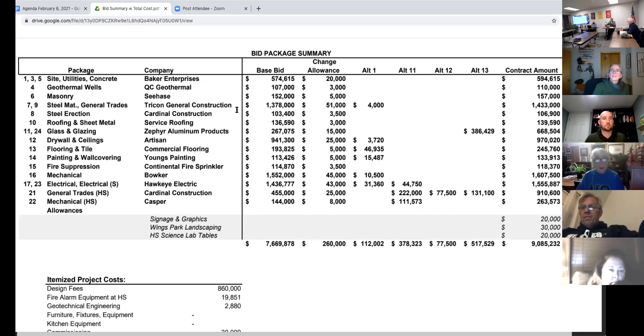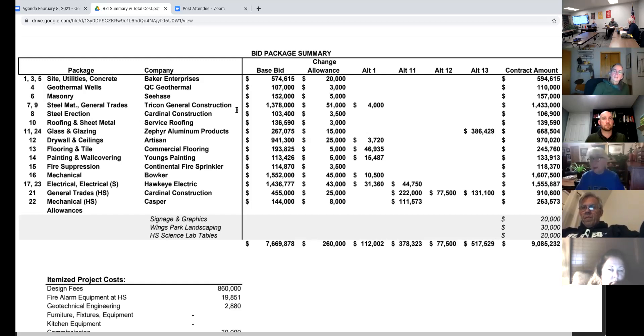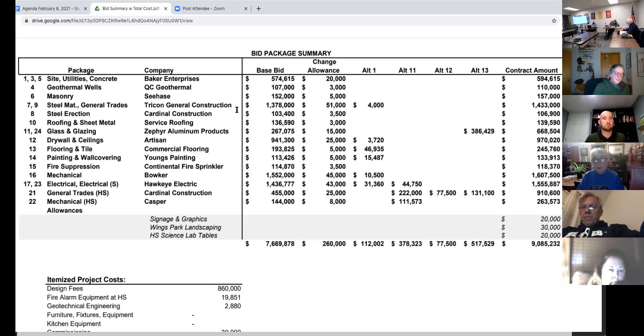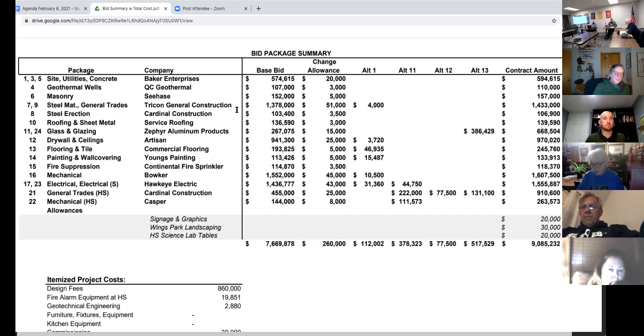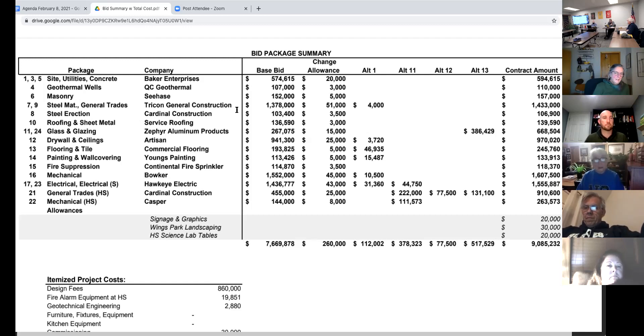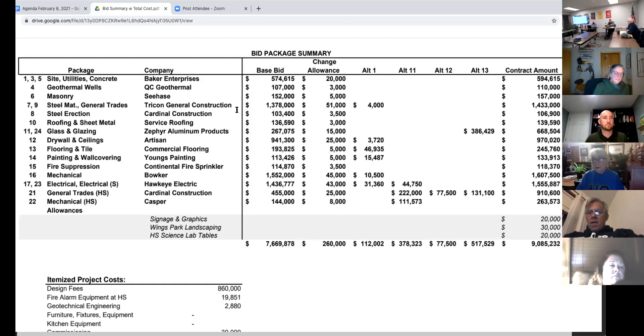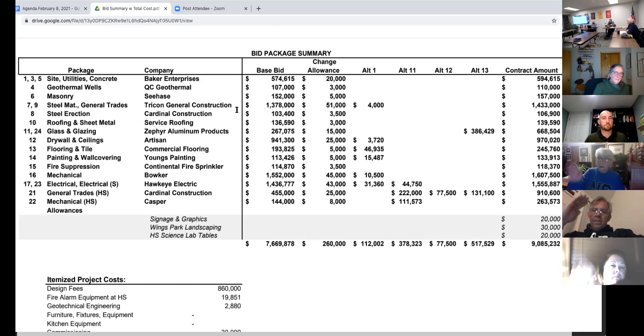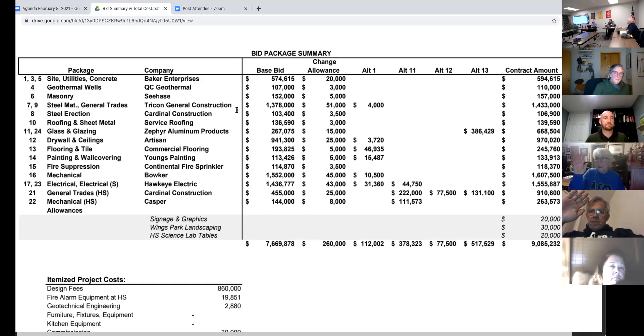I move that we accept the bid packages as presented by Boyd-Jones for Wings Park and the high school. I move that we approve the Wings Park and the Winehouse High School remodeling bid package construction contracts and accept alternative bid packages 1, 11, 12, and 13. Is there any discussion? None being heard. All those in favor, raise your hand. Opposed? Motion passes.